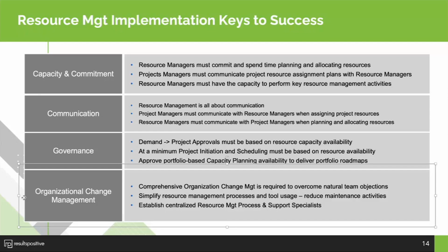Those activities range from: I've got 5 projects on hold, I have 5 projects that need to be extended out, we have 5 new projects. So I need to update all of our staffing assignments, plans, and allocations for each one of those projects. That's a lot of maintaining that we need to do. And so that's why it's so important to focus on the organizational change.